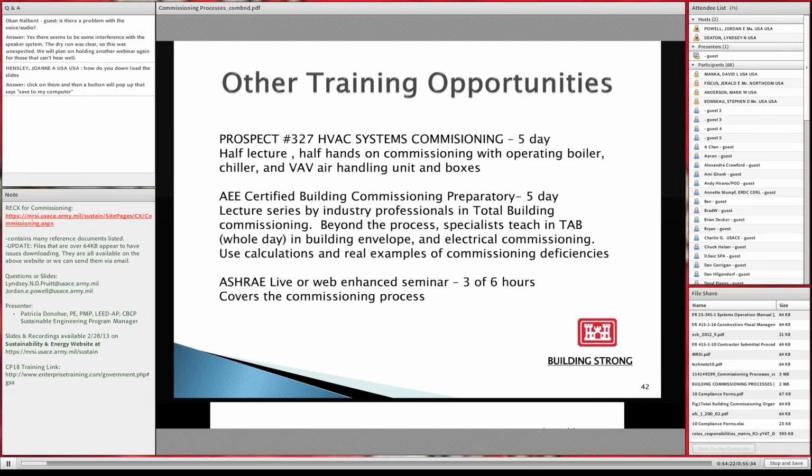So for the design activities that occur prior to the award, planning and design, P&D, funds should be utilized. For activities occurring after a construction contract award, the design agent commissioning activities should be related to extension of design and will therefore be funded by engineering during construction, EDC resources. Construction agent activities should be funded with S&A, supervision and administration resources.